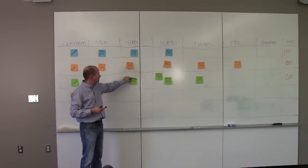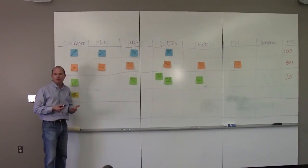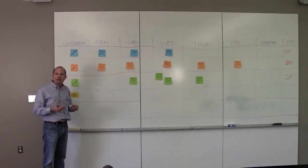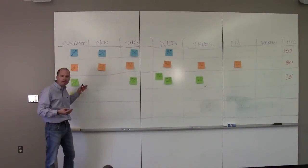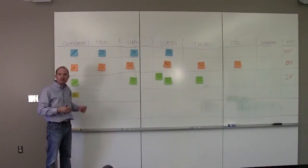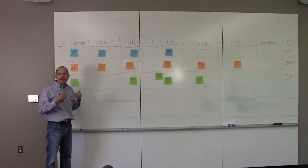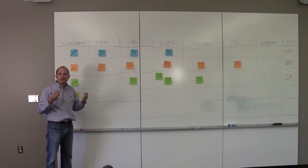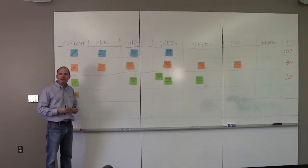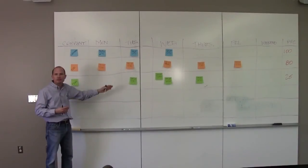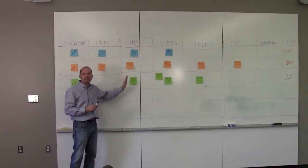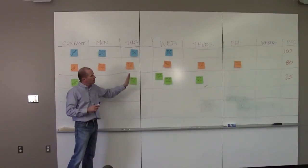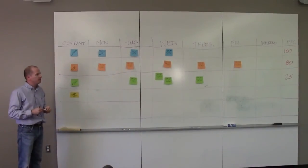So keep in mind, if they got it done early, that still counts as a zero. Now, if they realize that they can get it done early and they talk to the parties and they talk to the team and say, hey, this is an area that we didn't plan on getting into and we'd like to get into it because of X, Y, and Z. Is that something that everybody is okay with? Then you can rework the schedule and that's okay. But the idea is to make sure they're as predictable as possible.